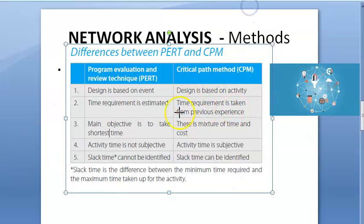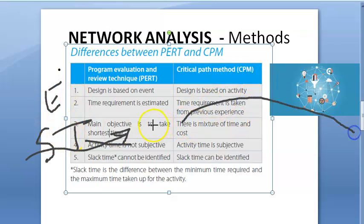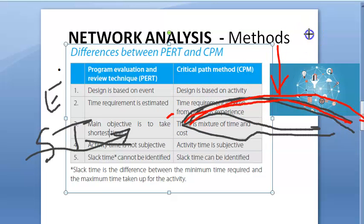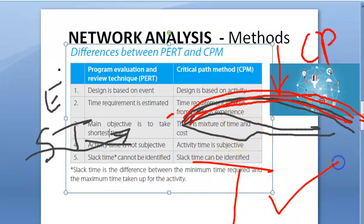In CPM, because you know the time from previous experience, you can determine the critical path — which is the longest time path. Your objective is to reach the destination in the shortest time. The path that takes the longest time is the critical path, and this will decide your total project time.